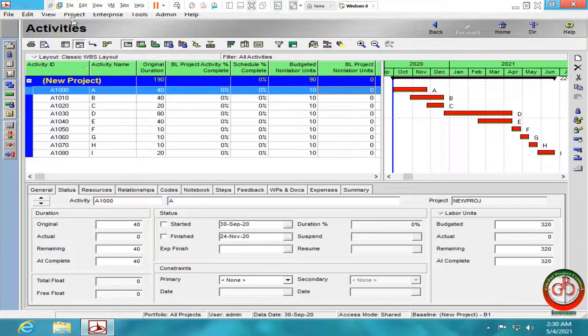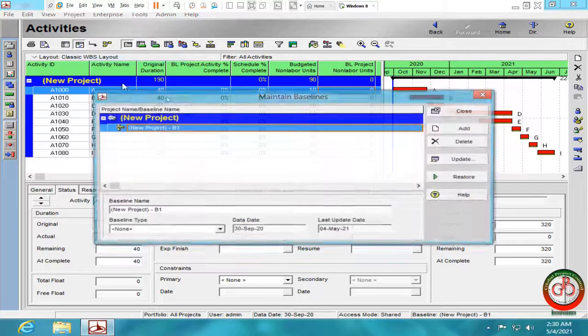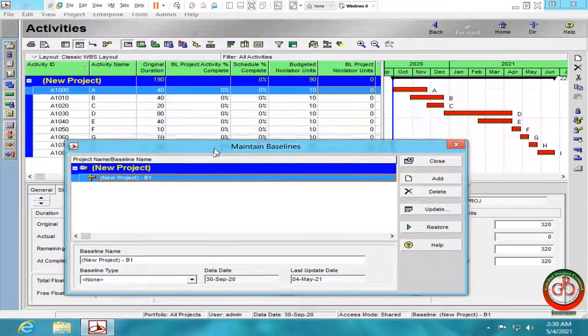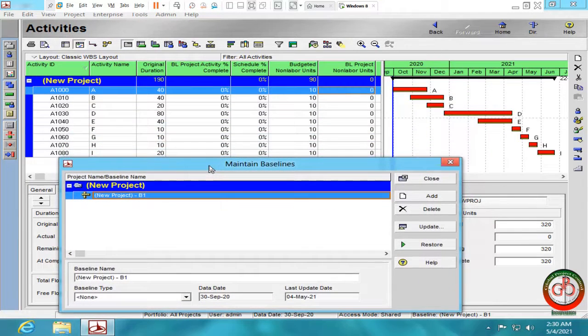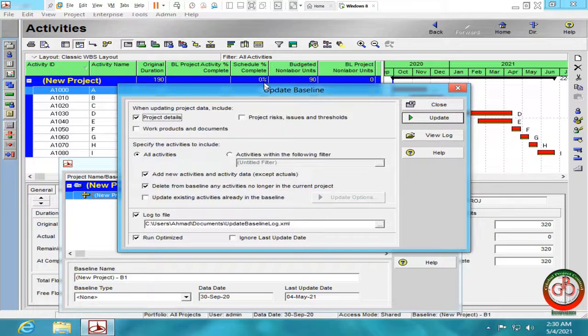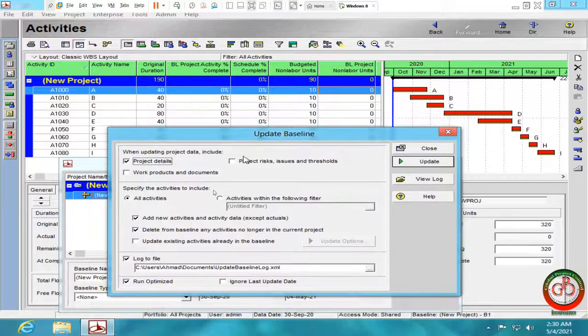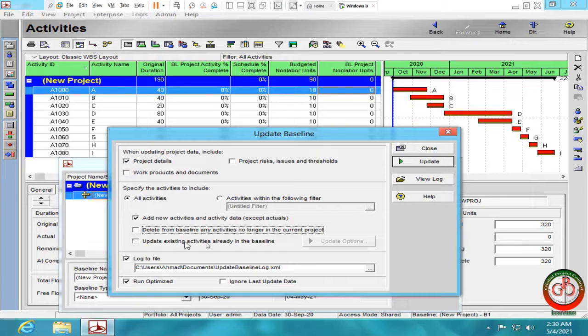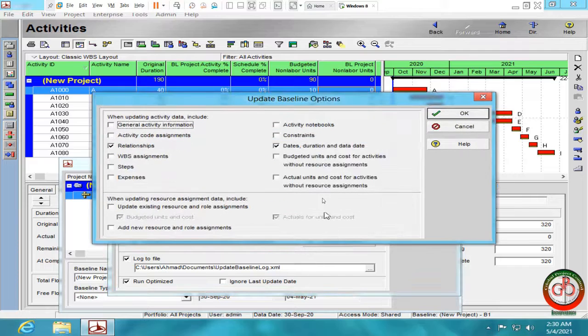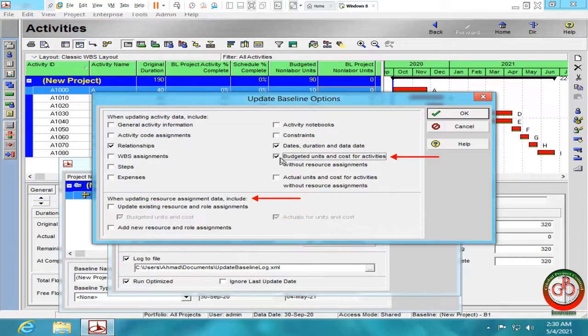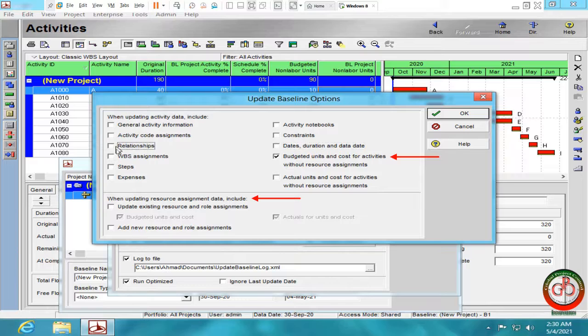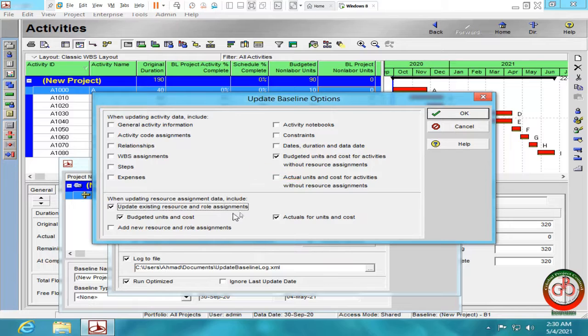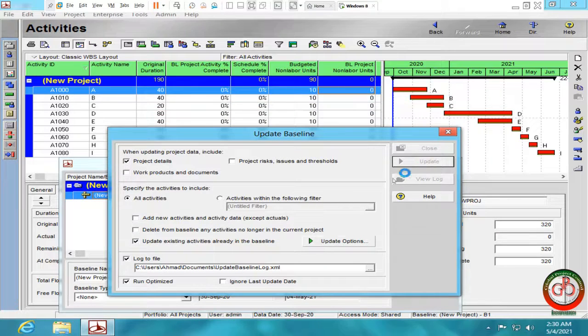I should go to the project, select maintain baseline, do the update, and go to the update section. Then select the budget, unit, and cost, and also you need to update the existing project, resource, and role assignment. Then go for update.